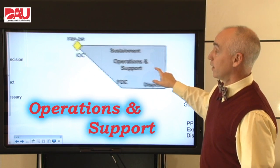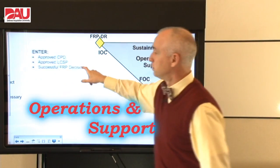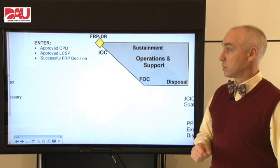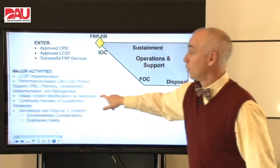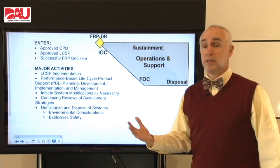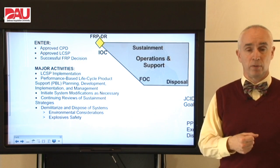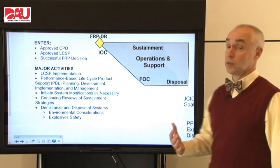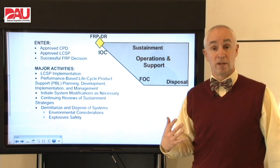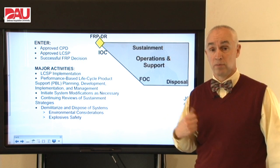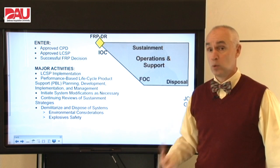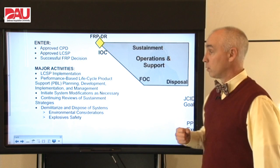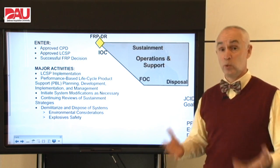Operations and Support is our final, longest, and most expensive phase. To get into it, we've got to have an approved Capability Production Document, an approved Life Cycle Sustainment Plan, and a successful full rate production decision. Major activities include implementing that sustainment plan through a philosophy of performance-based life cycle support, or PBL, where we incentivize our support organizations within the government and our contractors to provide better performance for the warfighter — meaning better reliability, quicker turnaround times, and quicker repairs — so that we have more uptime and less downtime for our systems, and do it affordably.